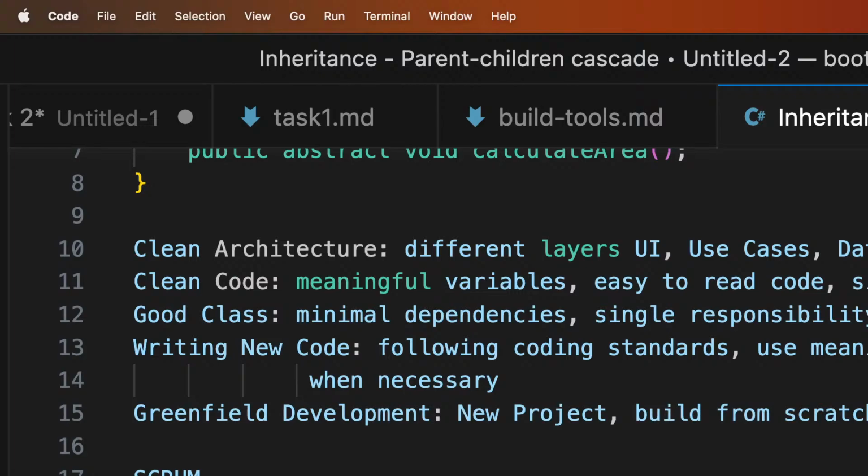So what do we need to achieve? For example, if we are building an Uber clone system, we may say that, okay, for the first 3 months, this quarter, what we want to achieve is that we should be able to have a database setup, a basic driver record setup, and then inventories. Let's say inventories now. I might say that we can't achieve inventories now. Let's move that to next quarter. So whatever you can achieve within that quarter is done for sprint planning.